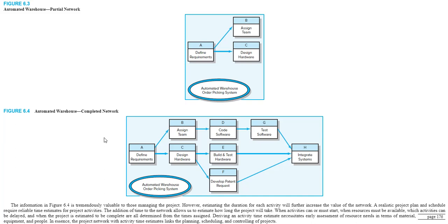The issue here, though, if you look at this network diagram, you'll see some activities are in sequence, one after another, whereas others are kind of in parallel. For example, D, E, and F are in parallel. For example, going back to the making coffee analogy, while the coffee's brewing, you may go get your cup, your spoon, your sugar, your cream. Those things could be done in parallel while the coffee's brewing.